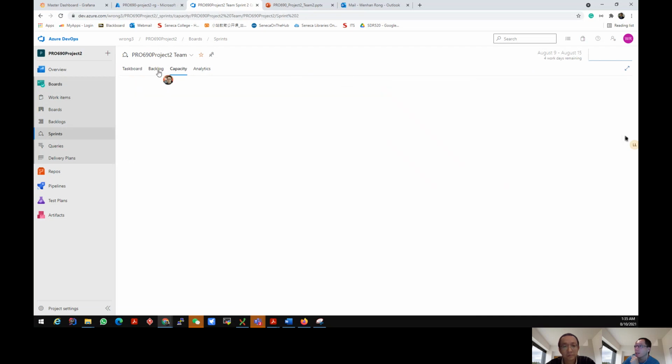And we can see the capacity setting here. Leon needs to focus on development, and the capacity per day is 5. And also, he has 1 day off.